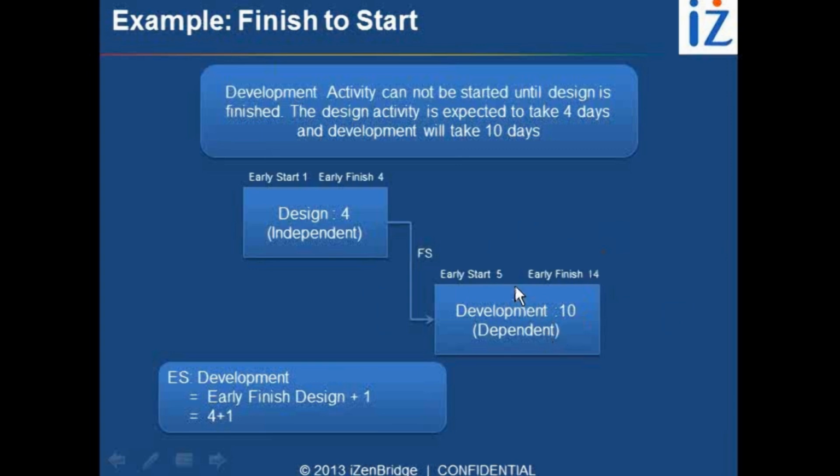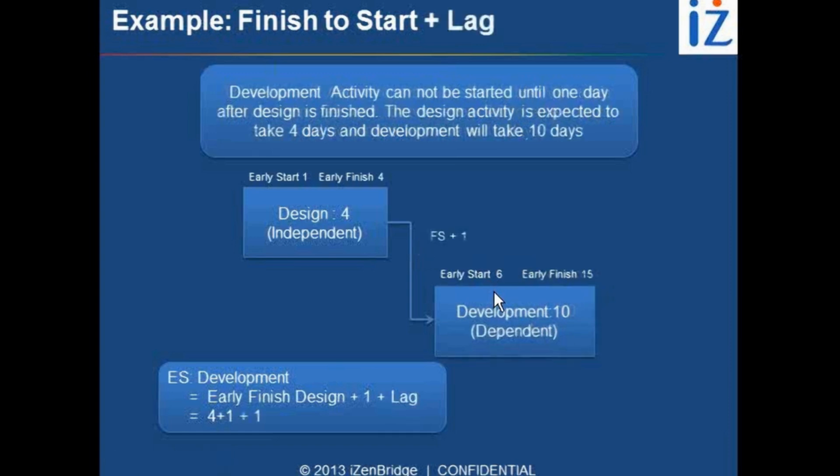How to calculate this? Start time plus duration minus 1 is the end date. Most of you must be very familiar with this.